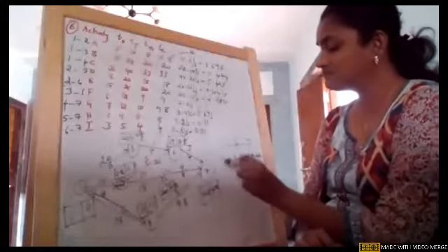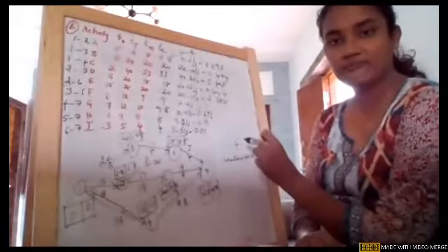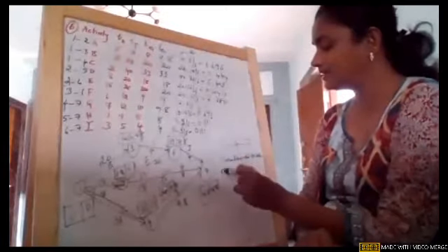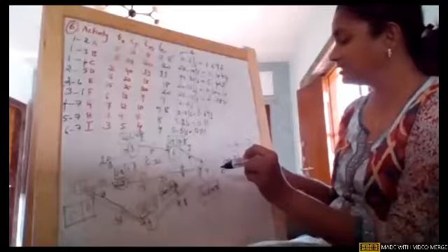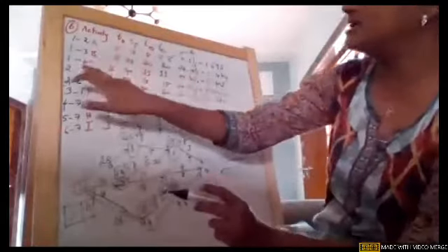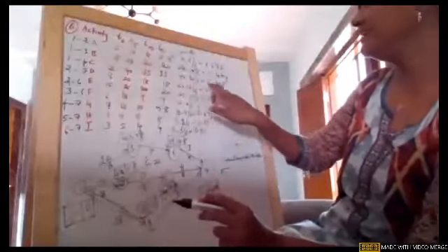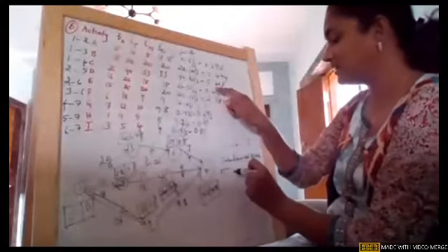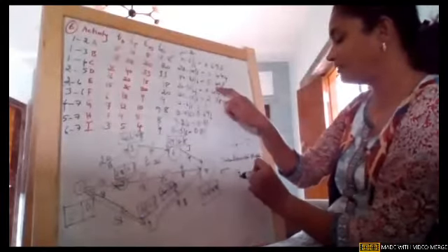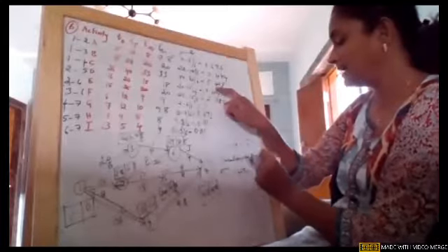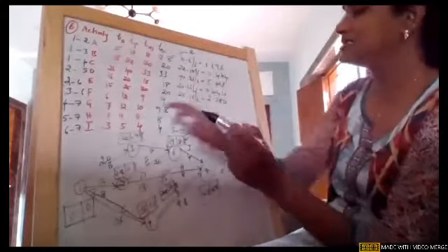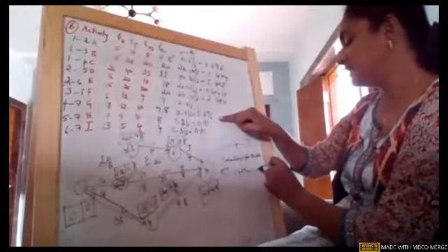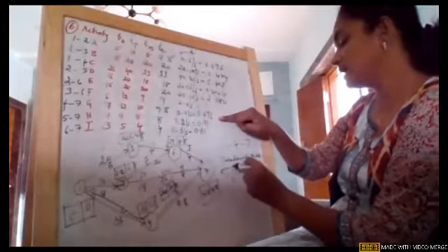Immediately what you do, girls, for this particular 1 to 4 to 7, you need to find out the standard deviation. Why? I'll let you know later. For the standard deviation, you go back to these activities. For 1 to 4, the variance, this is variance, girls, remember, so it is sigma square, not sigma. So 5.429 plus, for 4 to 7, the variance is 0.696. So this is under root.